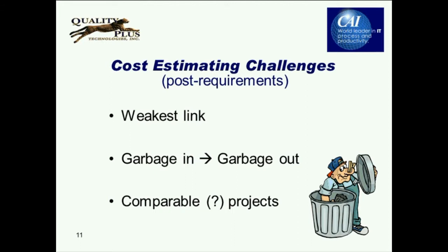We also need to know what were the starting and stopping points. If project A starts at the beginning of requirements and project B starts at the beginning of coding, are they comparable projects? No. Now we're comparing apples and oranges. And even though we may have hours, every hour is 60 minutes, every minute is 60 seconds, they're not comparable. We've also got the consideration of whether or not overtime is included. So we've got to really have solid comparisons. We've got to put lines around the box for these project hours if we truly want to have comparable projects.